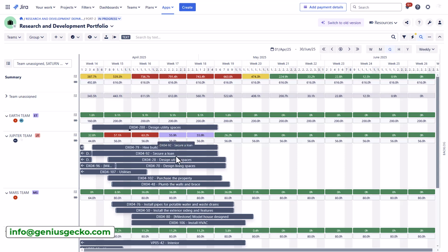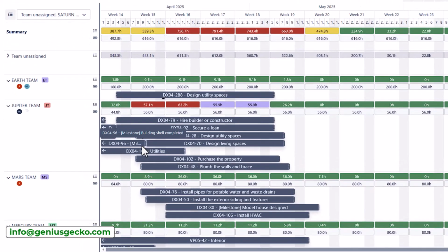So you can assign work to teams instead, and not worry about the individual capacity of each of the team members. Rather just look at the team's capacity. BigPicture will tell you whether you have exceeded the total capacity, which takes into account all the non-working days when your resources will not be available, and later on the team leader can distribute work across their team.